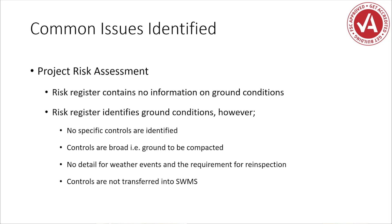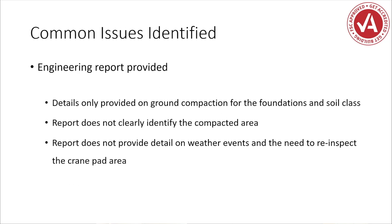Another issue: the project risk register contains sufficient information, but that information hasn't been transferred down into the SWIMS. The SWIMS itself is the site-specific component the workforce is working towards, so it should contain the relevant information — but sometimes that gets missed in the review process. We also find specific engineering reports, but sometimes the engineering report is predominantly on ground compaction for footings and foundations and the soil class, with no assessment of the compacted area where cranes are set up or traveling. We need to make sure the report clearly identifies the compacted areas, not just an overall general statement.